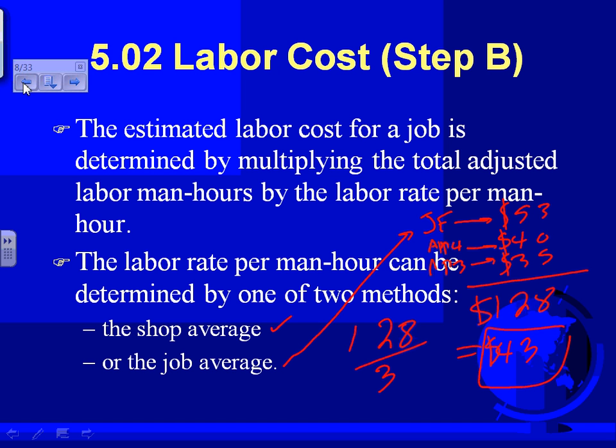When I bid it, that number we talked about, you stick in $43. That's your job, that's the minimum crew. The best thing to do is more apprentices and fewer journeymen, dollar-wise, but you can't have more than 2 apprentices to a journeyman by law. So that's the minimum you can get, 2 apprentices by law. You can make your crew cheaper than that by hiring.